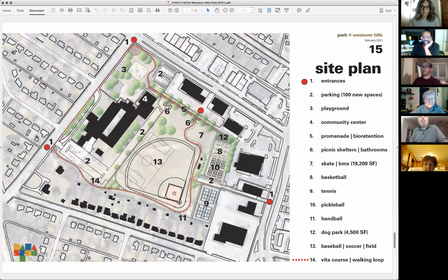I do know, just a quick recap of what Ryan stated earlier, and just understanding the next steps for the master plan: this is the conceptual master plan, and it's just to get more buy-in from the community, figure out what that final master plan is going to look like, and then that goes to the urban design committee for a review, and then the planning commission to approve the conceptual master plan, and then at that point they can really start looking at what type of funding they can potentially do. So this would be a phased approach with the full project. That's just a quick synopsis of what Ryan said. I don't know, Bert and Jill, if I missed anything. Sounds about right.